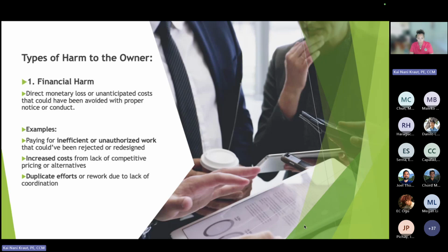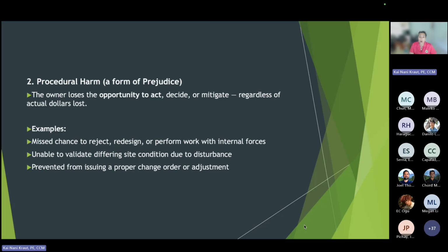They had their worst guys out there, a bad crew. They would get maybe half a day of real production, all of those things. The inspectors will be out there making their observations, but the engineer really needs to chronicle it themselves to make sure we can document harm.